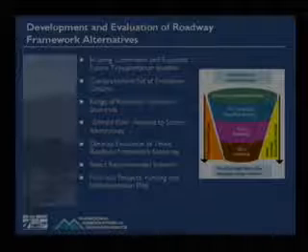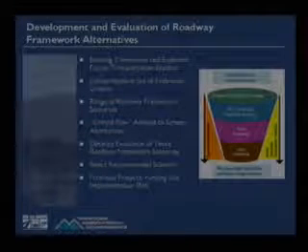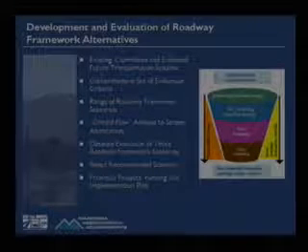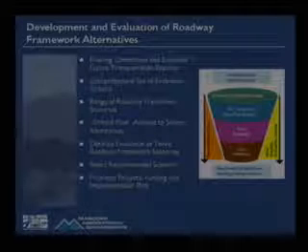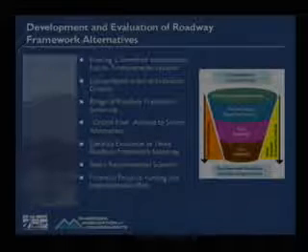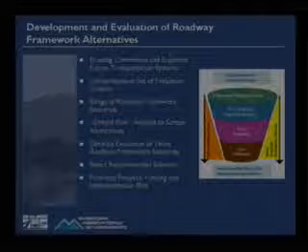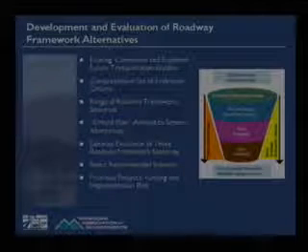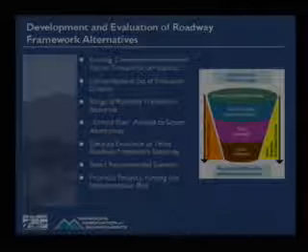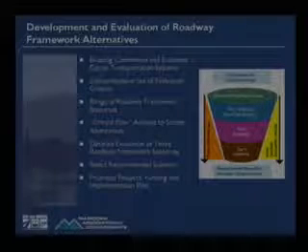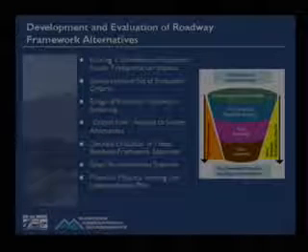Just to give you a brief background of how we're putting the project together, we're working through a funnel approach. We looked at what we call the universe of planning concepts for the area, and we've done a screening on that, a fatal flaw analysis. We're also now working through our second and third tier of screenings to get to what we call a recommended scenario.